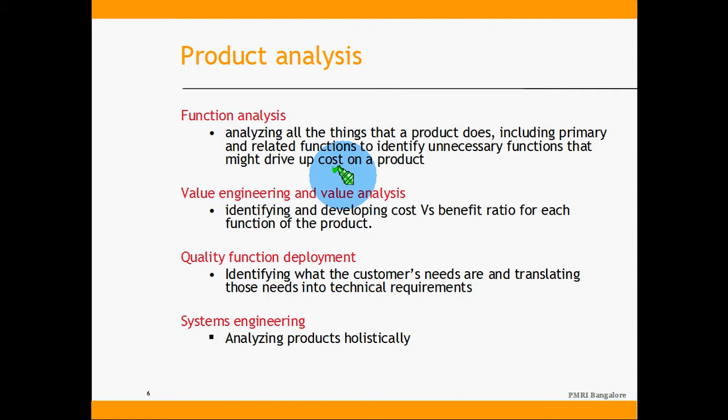Now, when a car manufacturer is launching a new economy version of a successful sedan, primarily it will be for cost reduction. They'll be talking about the prioritization of the features and then throwing out those features which don't have that much impact on the customer requirement. Primarily, we can classify the requirements into the must-have requirements, the should-have requirements, and the nice-to-have requirements, and then document them.